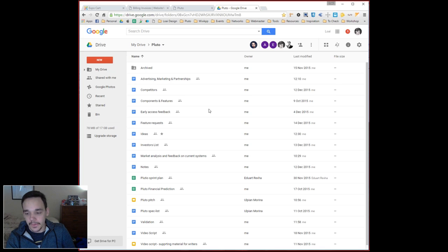Exactly. So let's say most of them are web design and development. The workflow mostly is briefing, then website design, then website development, then website review and approval and launch, etc. You can set these default milestones, and by default assign people to them. So when you create a new project, you can just say apply this template to it, and it will add everything and assign it to everybody. You might just need to tweak a few things, and it's ready to go.